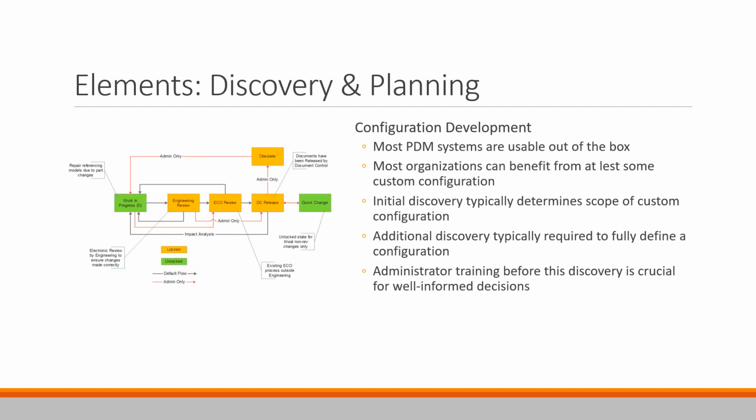At this phase, there's also typically going to be a bit more discovery required. Generally, at the beginning of the process, you're not going to necessarily ask all of the questions required to develop the configuration. Otherwise, you may never get the project off the ground. So the discovery that happens during configuration really needs to be made in context of the tool that you're using.